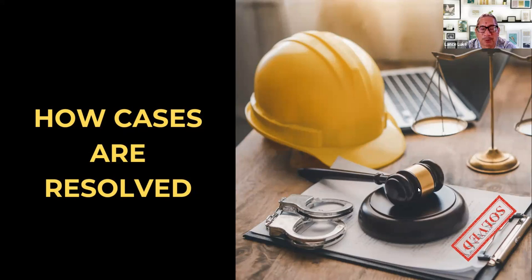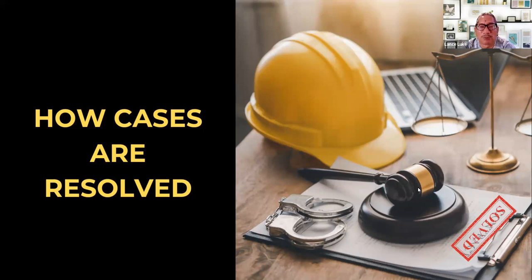Obviously when it rains, water flows downward — and in this case downward was into the house. Both the architect and contractor were responsible. The owner gave me the architect's name, then the contractor's name, and it turned out to be the same name. It was a design-build contract, meaning the designer and contractor are the same entity. In this situation that wasn't ideal because you only have one party to sue instead of two.